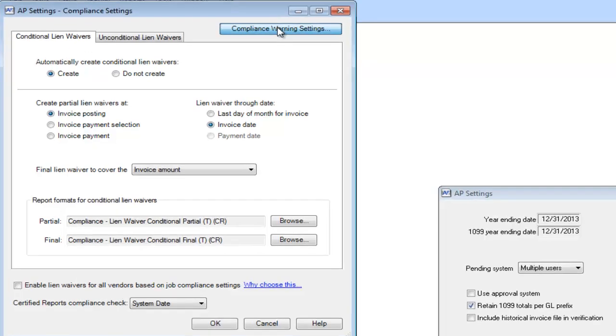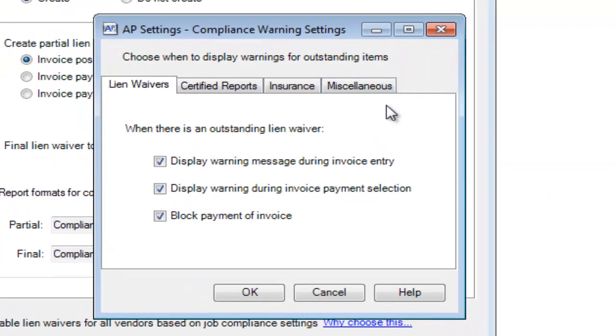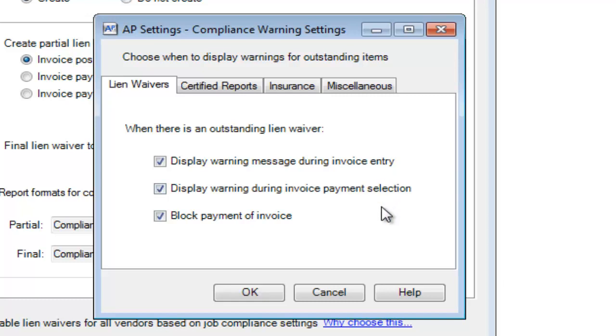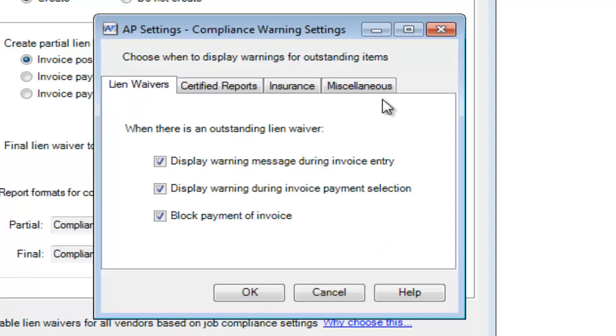In the Compliance Warning Settings button, you can have whether or not you want the warnings to display when you're entering in invoices, or selecting them for payment, or if you just want to block payment unless they are in compliance. You can do this for all four items, whether it be lien waivers, certified reports, insurance, or any miscellaneous item.